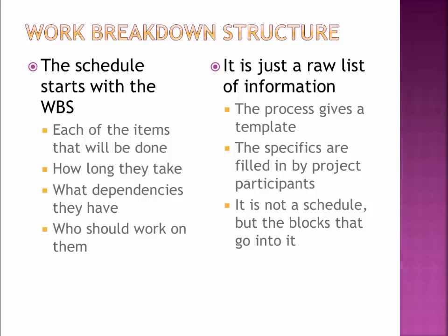So I don't want to just say write requirements. What requirements are you writing? You have functional and non-functional. There's a breakdown right there. Well, for non-functional requirements, maybe you want to break that down further. I'm going to do usability requirements separate from performance requirements. Your functional requirements, well, maybe I'm going to do administrative site requirements separate from public site requirements, separate from mobile app requirements. You can break it down to whatever level you need to better understand it. But that's going to be the foundation for how we get to this.